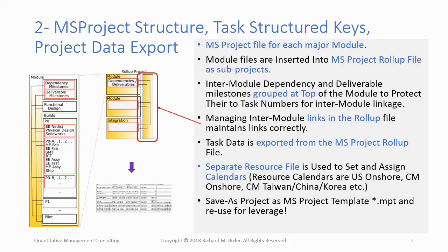Then, when closing the master rollup MPP file, save all the GANTTs when prompted, thus saving the changes within each element GANTT. It's reasonable practice to routinely update logic within the element GANTTs from within the master rollup file instead of from within each element GANTT. But that's often practical only if the element GANTTs are all local to the rollup.